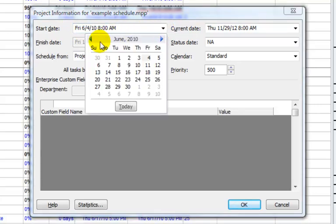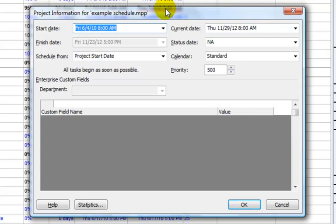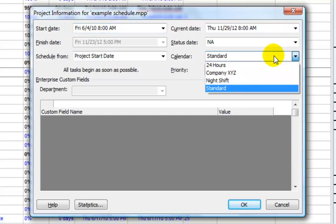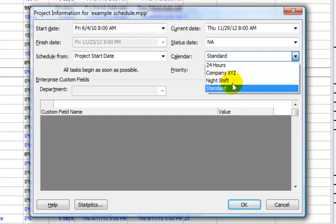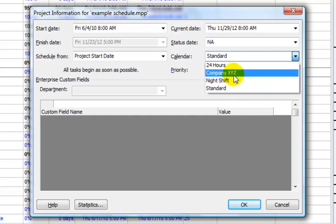When you click on the drop-down arrow, a calendar will appear. You can scroll forward or back and select the date that your project will start. You can also define if you're using a standard calendar or if you've created a custom calendar. Project comes loaded with a standard calendar, a night shift calendar, and a 24-hour calendar. This is an example of a calendar that we'll walk through that I created separately.